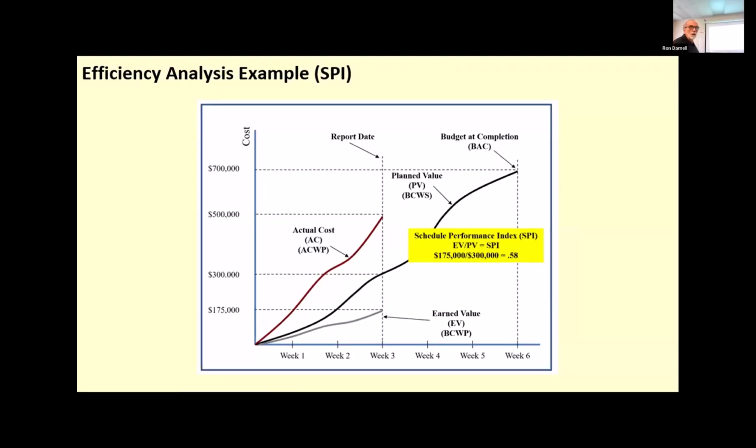So how do they know the earned value in a project, how do they get that number? They know the planned value, right? The question is, how do they get the earned value? Well, as you complete work, you're going to show it completed in your baseline. And then you're going to basically just add up the budget numbers for that.